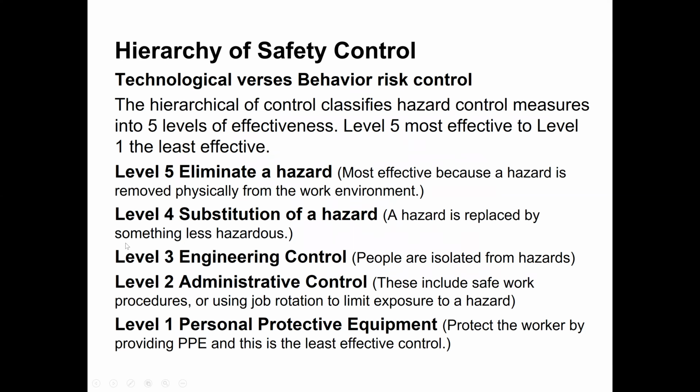Level 4 is a substitution of a hazard. A hazard is replaced by something less hazardous, so it's a substitution, a replacement like that. And then third is engineering control. People are isolated from the hazard. So that is engineering control.